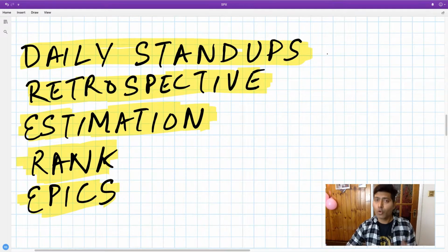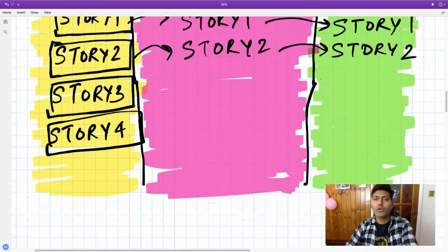And it is still okay if you're not able to finish all the stories. You can take them in the next sprint, which is ideally the case, because if you're not able to finish something, it will go back to the backlog on top, and you can handle it in the upcoming sprint. After every sprint, you will also deliver something.